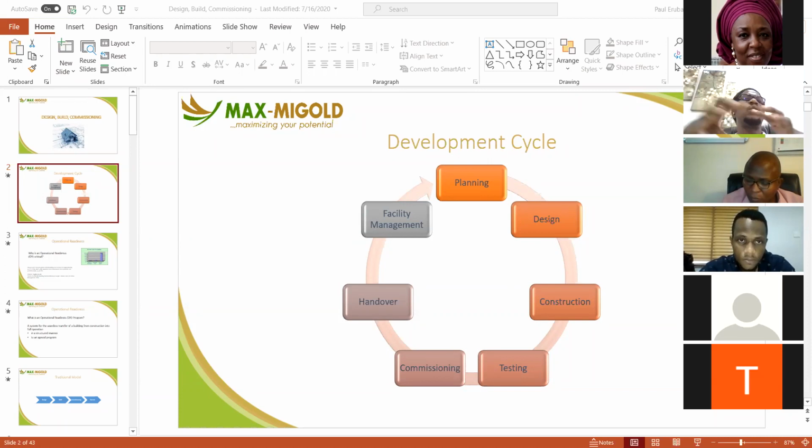There are some things that may not be commissioned, but that needs to be provided for in the contract from the onset. And then, because you are going to have a defects liability period where you hold a retention amount of the contractor's money, for example, there is that expectation that you will do commissioning during that period, so that you can release that money at the end of the period and close the contract afterwards.